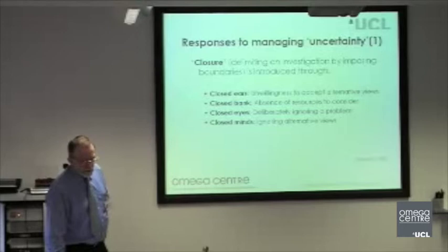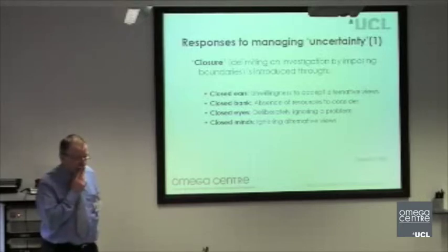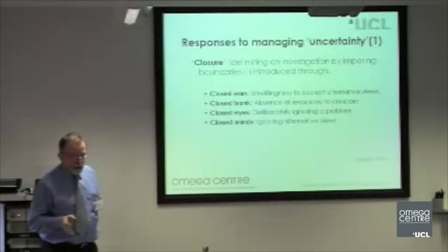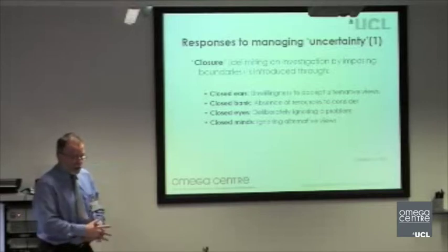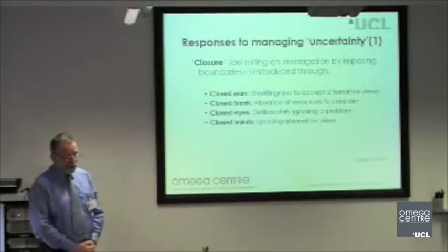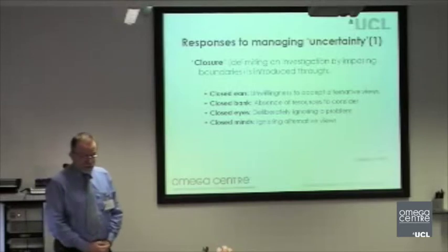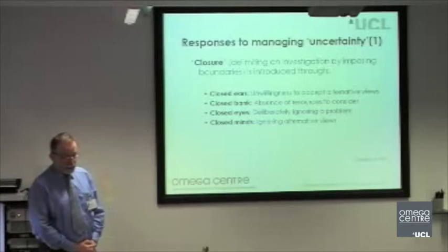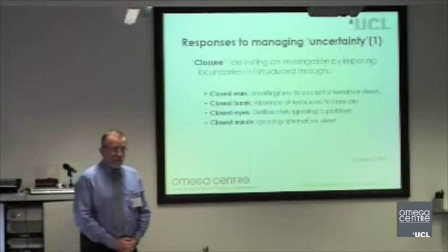Looking now at the responses to managing uncertainty, one word that's used here is sort of denial, really. The term closure. It's delimiting an investigation by imposing artificial boundaries around the problem. So I've called it here, for convenience: closed ears, that's an unwillingness to accept alternative views; the closed bank, absence of resources to consider the problem; closed eyes, deliberately ignoring a problem; and closed minds, ignoring alternative views from others.